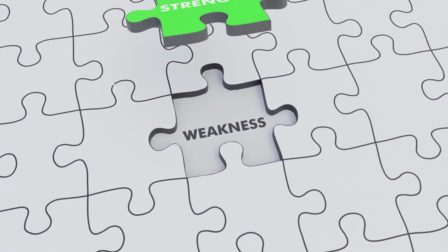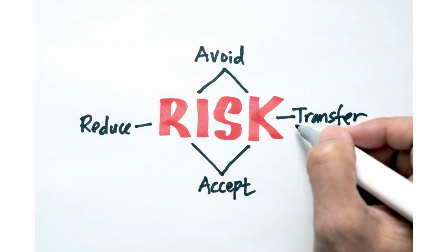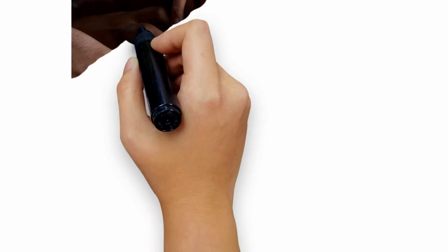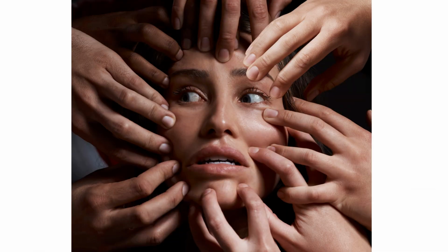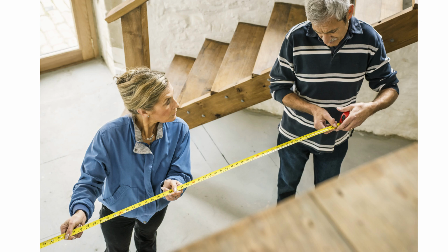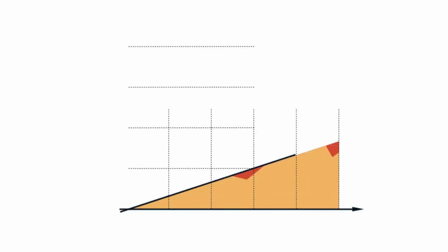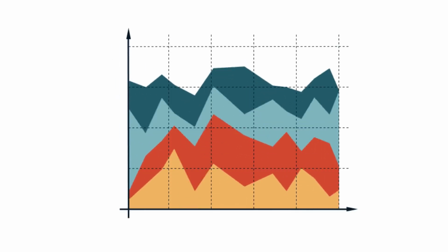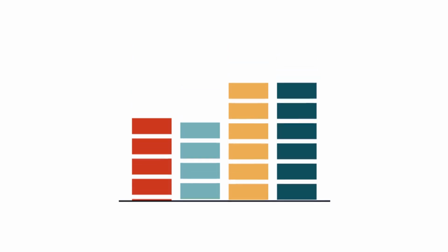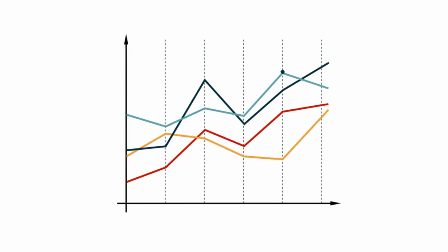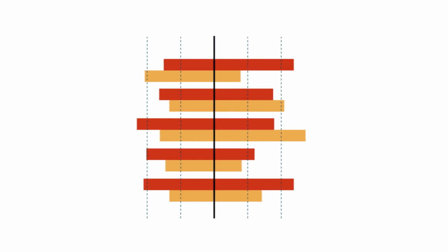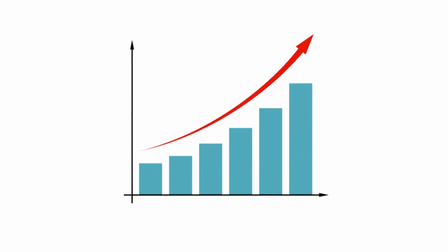Each buffer sizing method comes with its strengths and limitations. While the cut and paste method is simple, it may not capture the true risk in complex projects. Method 1, 50%, might overestimate or underestimate buffer size based on project risk. The SSQ method requires detailed data and accurate variance estimation, which can be challenging. Adding bias in method 3 helps manage unknowns, but it's subjective and can lead to over or underestimation.